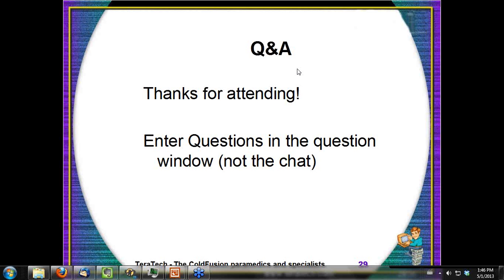And then if you've got a good set of requirements, often it can be reused and turned into the test plan for the project. So you get double benefit from writing good requirements up front if you can.